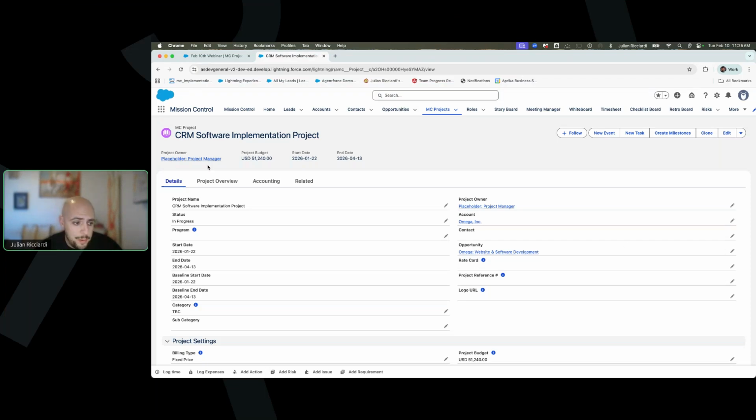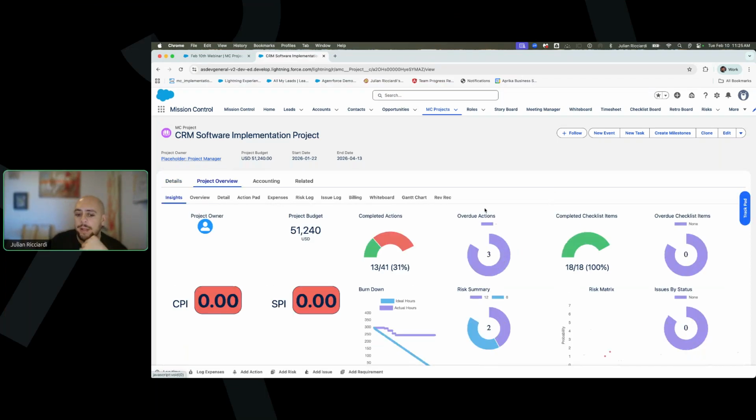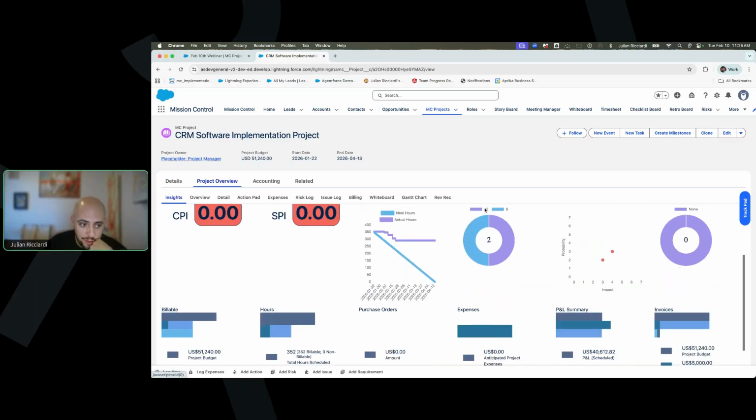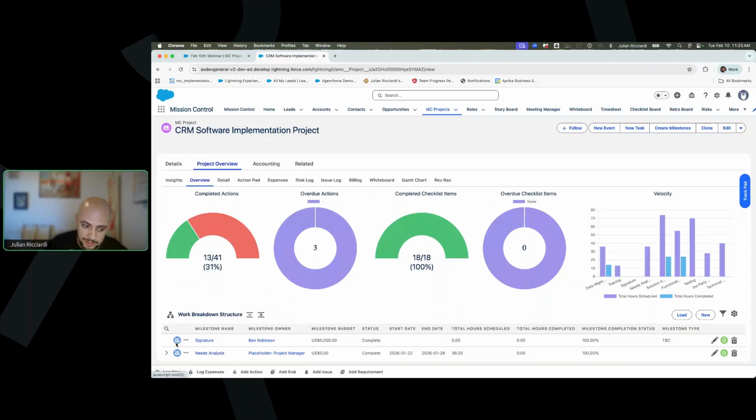So in terms of what I mentioned earlier, going to that billing element, how do we make money? In terms of this project over here, what we have is a billable milestone. Let's say you were doing a retainer, if you go into the edit field, you could say, hey, create a new retainer, on whatever cadence or whatever start date you're looking for, and whenever there's that trigger that says, hey, we need a new billing event, it gets pushed to our billing tab over here.